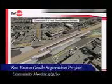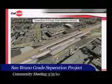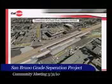So essentially what we'll do is we'll bury that middle wall and we'll build a third wall on the outside, and we'll build up another two tracks' worth of width. Okay? Now what you're seeing right now is everything but the tracks, and that's deliberate, because depending on where high speed is at that time, they may not be ready to build those tracks right away. There may be a month or so lag.